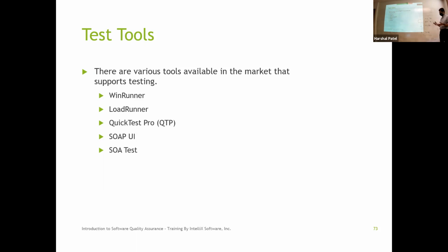So typically, what people do is first figure out that I'm going to have some set amount of tasks, just like the architecture diagram when we talk about building a house. And I'm going to have some variable, and that variable is dependent on the number of requirements or the number of test cases that I need to test. And I'm going to add those two and then give an estimate. So they're essentially going to give you a fixed activity.